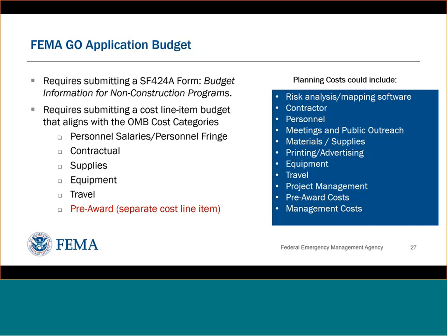And then project management costs, as the name suggests, those costs can be included. Just a note that this is different from management costs. I believe Brenna mentioned that earlier: management costs are those administrative and indirect costs associated with the overarching grant. So that's a little bit separate from project management.